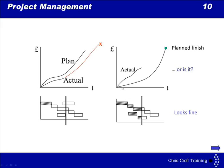What we need to do is we need to look at the spend profile, which in this case is this shape. Now where does the spend profile come from? We can get it from the Gantt chart. If we know that these tasks are relatively cheap and these are the expensive ones, then we know it's going to go like that. And you can do that in Excel. If you put the costs along each task and add it up, you can get the spend profile.